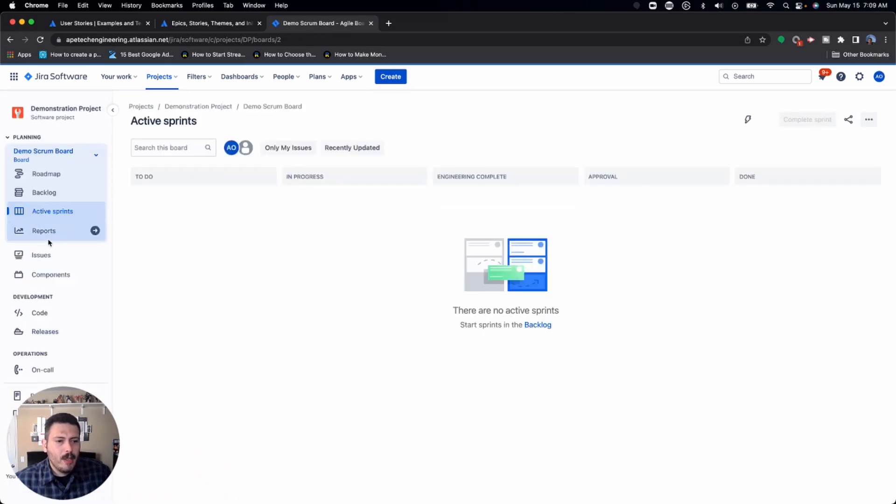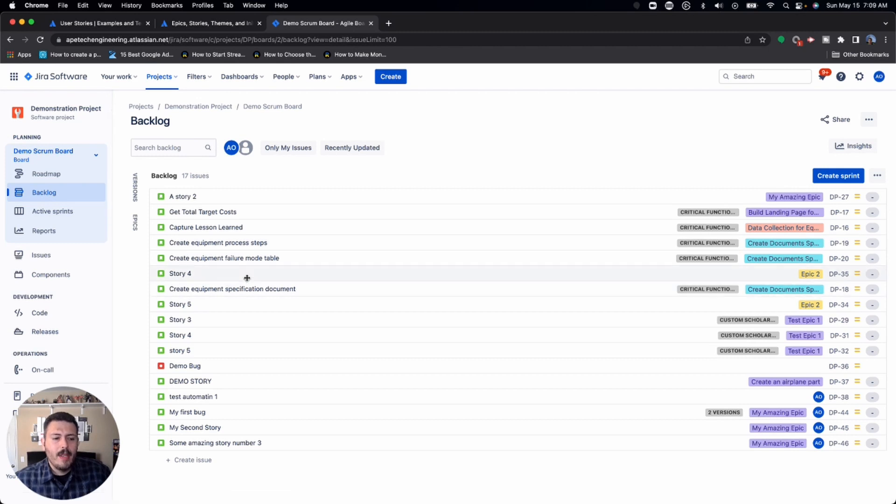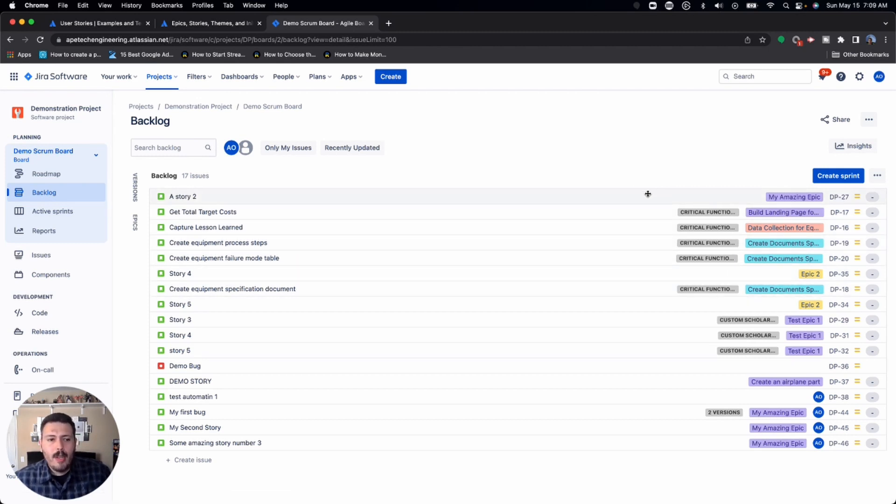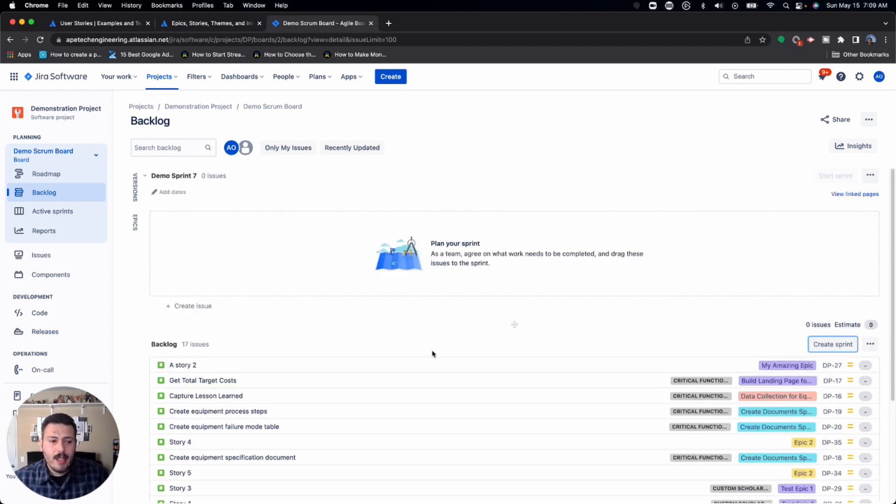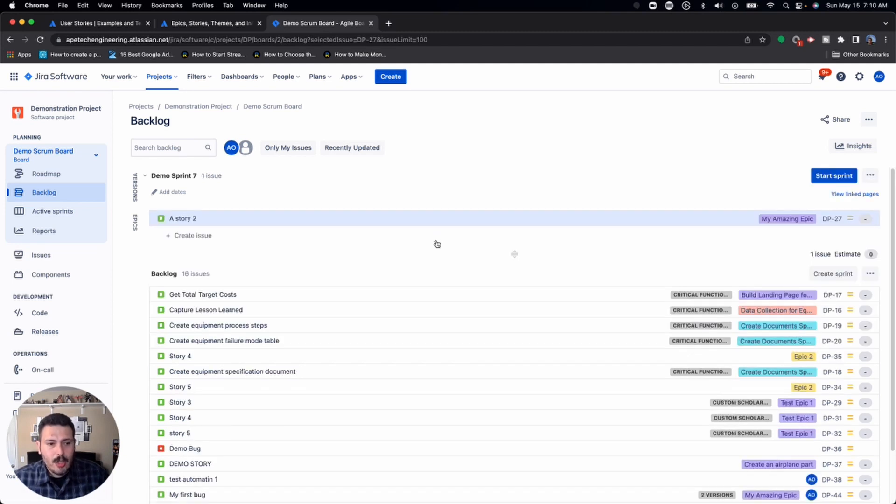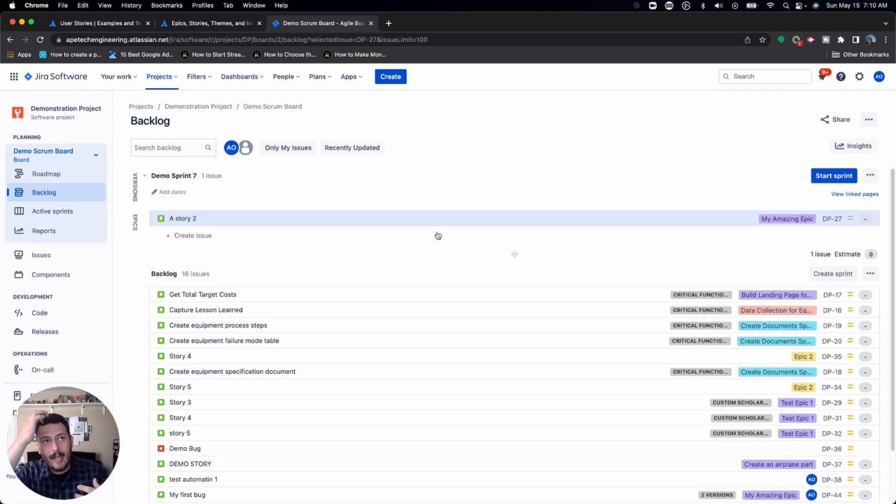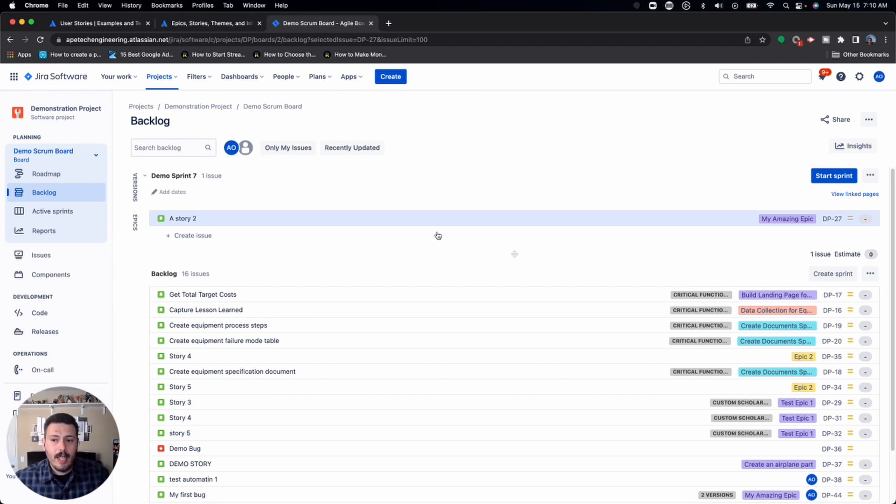So make sure you are in a scrum one. I'm going to jump back into my scrum one here and I'm going to be in the backlog. So once you're in the backlog, you could put the story points whenever you want. So you can put them in the backlog while the issue is still in the backlog, or as a best practice, I recommend you plan the issue into your sprint. And then you do whether you're doing poker planning or maybe you just have your team at that point do the estimates in there.